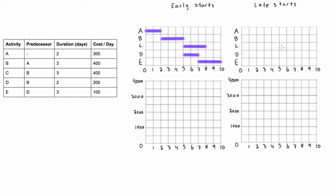Now let's switch to the late starts. By looking at the dependencies, we don't actually need to draw the PDM network diagram. You can see that A, B, D, and E are on the critical path, so activity A has to be drawn from 0 to 2 for its late start, same with B at 3 days. Activity D goes from 5 to 7, and activity E goes from 7 to 10.